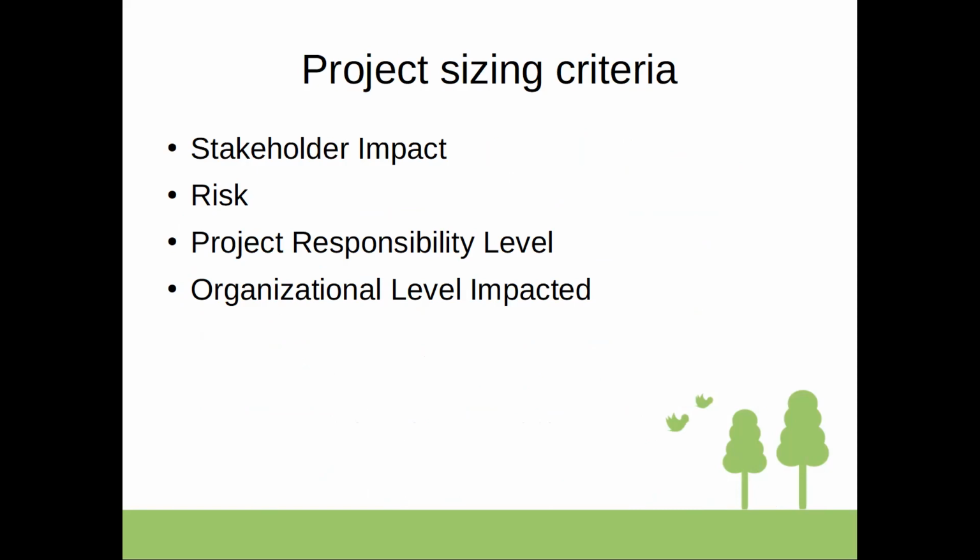You just multiply the number of people by their cost and by the hours they spent. Straightforward. There can be various custom formulas, but it's very, very specific to each organization and each project. So I can't really say that there would be some template that you can use out on the internet. So for the straightforward approach, just multiply.